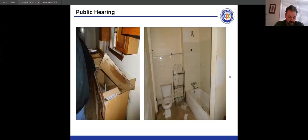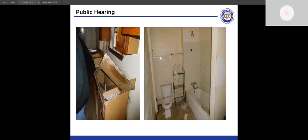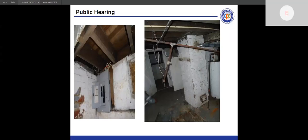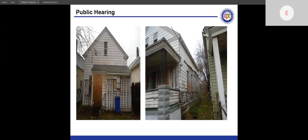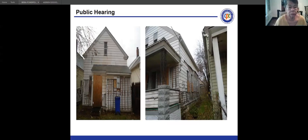A board member noted this is a condemned structure, so it needs plans. Mr. Vanover clarified that as a residential structure, the appellant can submit a rehab plan under the residential rehab plan process. He also reminded the board that denying time and remanding to Building and Housing does not prevent the owners from pulling permits and repairing the property. Under the Residential Code of Ohio, if permits are active and work is progressing, the city will allow work to continue.